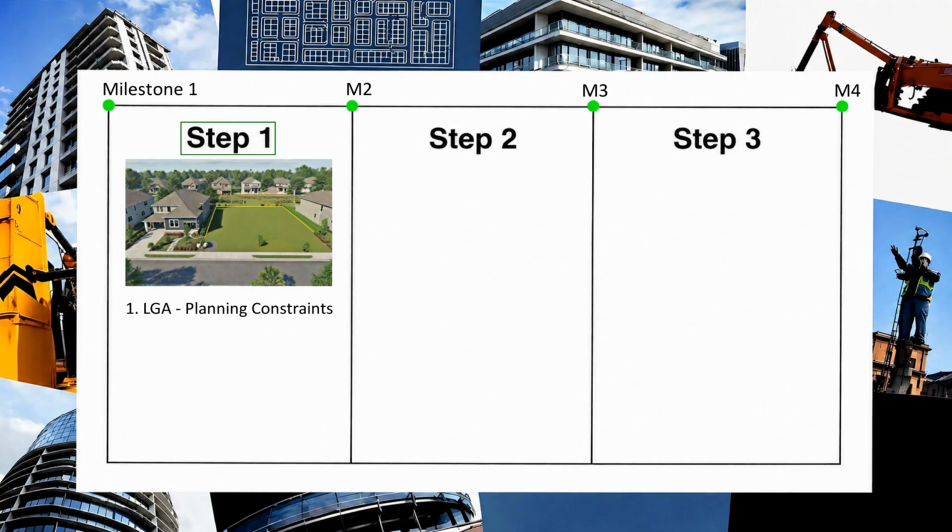And yes, for all you people that enjoy legislation, Chapter 3 of the Planning Act does clearly mandate and outline these planning scheme requirements. Check for state and federal government development triggers. You may have exemptions, so ensure you check the Planning Act and Planning Regulation and state and federal government accepted development documentation. For this example, federal government is not triggered, but state government is.